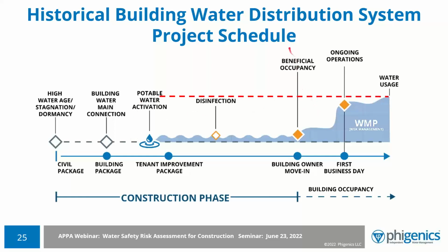Meanwhile, the standard is calling for it 3 weeks before beneficial occupancy. So then we move toward, they hand it off. It's a successful, let's say, building project. There's a punch list where it's substantial completion. So if you're not familiar with this term, it's substantial completion. They hand it over to the building owner.